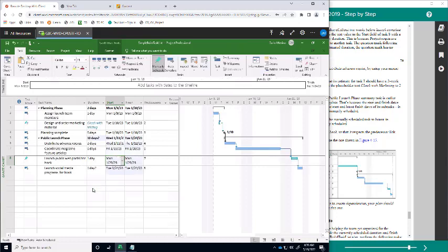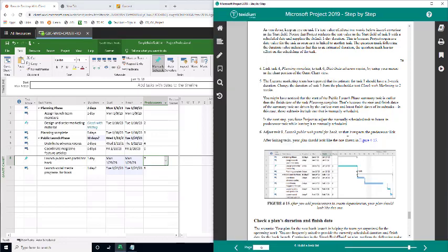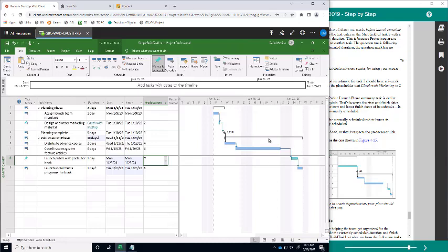Okay, let's do this. And I just managed to remove the problem that you do have, right? That's a warning that something might not be following the sequence that I previously set up for my project. That's exactly what it means, that I'd have to adjust this task so the predecessor link is being respected. That happens when your task is manually scheduled. If this would be auto scheduled, the date would have been automatically adjusted.